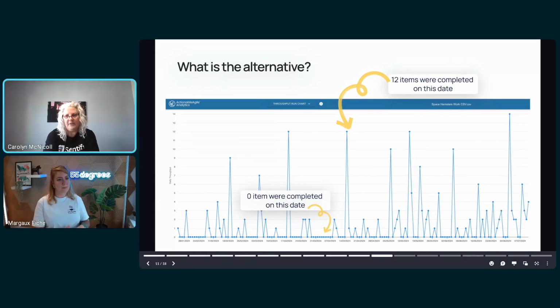And this is one of my favorite things, because on day one, I think, when we first installed Actionable Agile, we saw a lot of opportunity for data cleanup. We weren't managing the data the way that we should have been, or we were moving things to the backlog but not really changing the status. So it looked like things were in progress when they really weren't. That would have totally ruined our cycle time if we were using those metrics at that point. So we first cleaned up a lot of our data and understood how to better manage the board and the workflow.